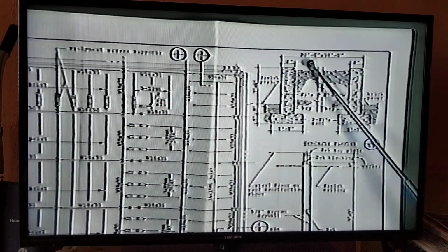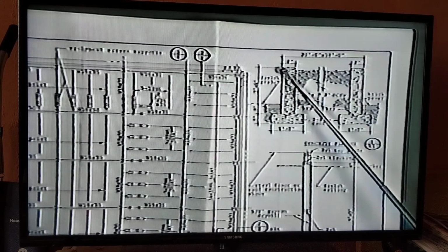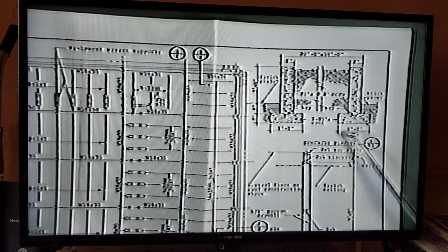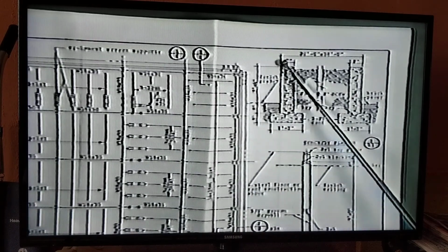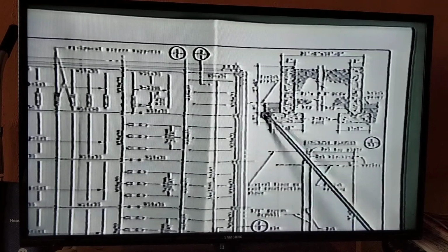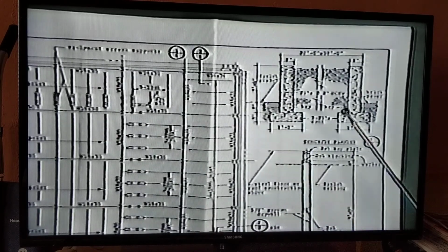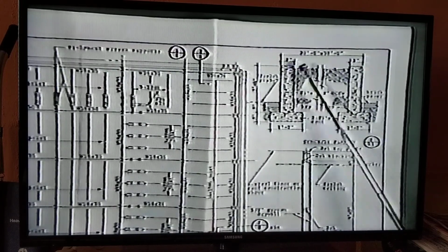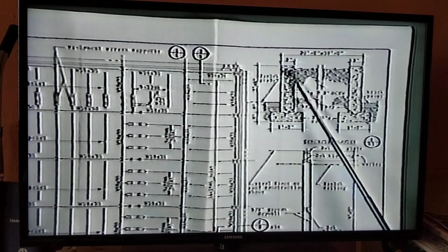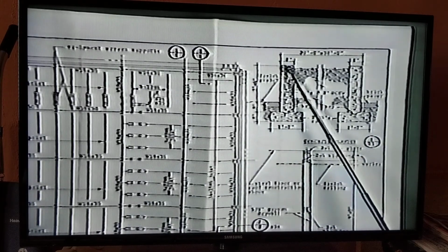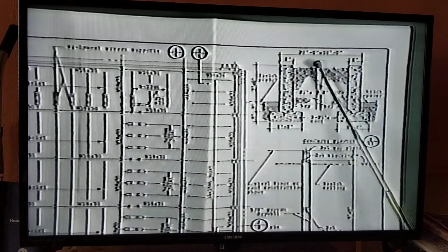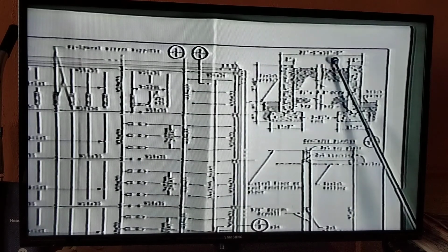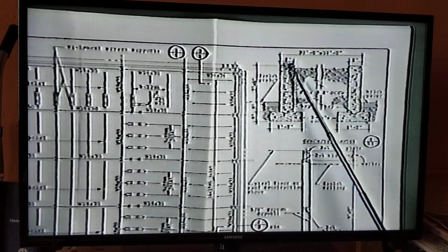So if we were working with measurements here, this 20 by 10 is telling us that it's the dimension from wall to wall. If we wanted to get to the outside edge of this, we would have to maneuver the numbers to find out what the distance is from this point to this point. In this case, the way we could do that would be to get the center line measurement here. See, this 20 by 10 is to the outside of the wall, which is 8 inches thick. So if we subtract 4 inches from one side and 4 inches from the other side, we subtract that from the 20-foot dimension, we get 19 feet 4 inches. And over here with the 10 feet, we get 9 feet 4 inches. And that's our measurement to the center.